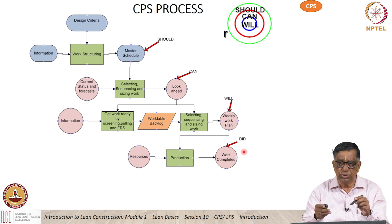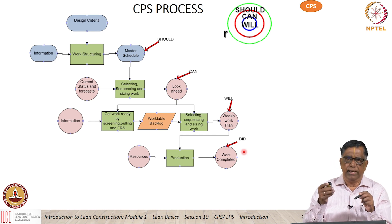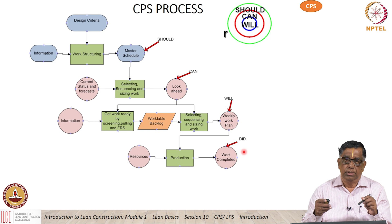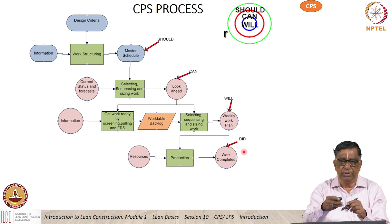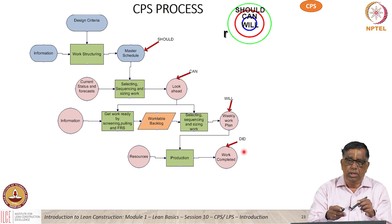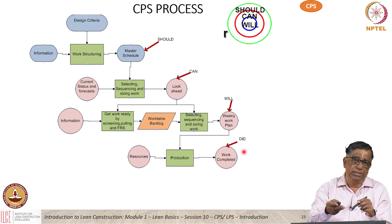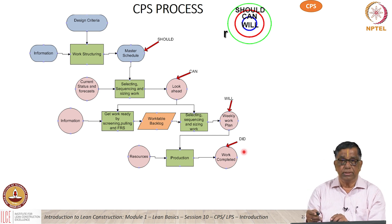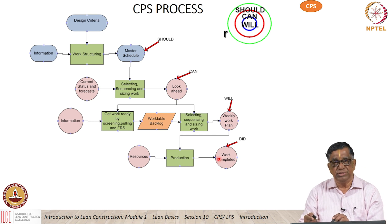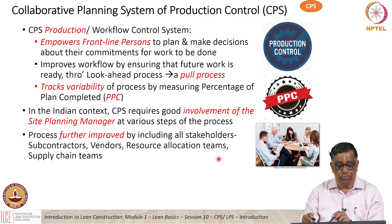At every stage we cover our backs. We identify the constraints and remove them. We have inter-promises and inter-coordination between the very people who are doing the work and who are able to supply the resources. Finally, at the end of the day, the man says each day, 'I did, I did, I did.' And your PPC — Percent Plan Complete — keeps on improving all the time.